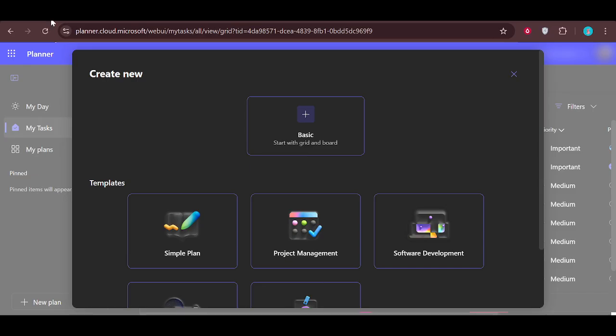However, if you're specifically interested in XML data, there's a key nuance. Not every environment supports importing XML directly through this same screen. In some organizations that use the premium version of Planner or have more advanced project capabilities, there may be an additional path available through the Power Apps interface. In those setups, XML data can sometimes be brought into Project or Planner by using custom apps or flows that your administrators have configured. What this means in practice is that if you don't see a clear direct XML option when you choose Import from Project Desktop, your ability to import XML may depend on whether your organization's administrators have enabled a Power Apps solution for it.